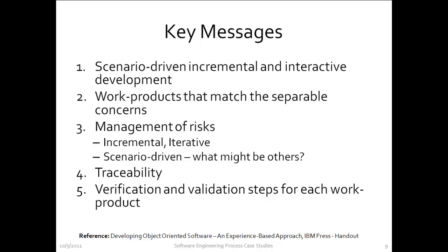The third key message is one of management of risks. So a lot of things will be done in these processes simply in order to manage risk. One of the reasons why a waterfall process, where all the requirements are collected in the beginning, all the analysis is done, the entire system is designed and then implemented and then tested, is not a recommended process, is really due to the fact that the top-down waterfall approach is very risky, because it does not handle change well.